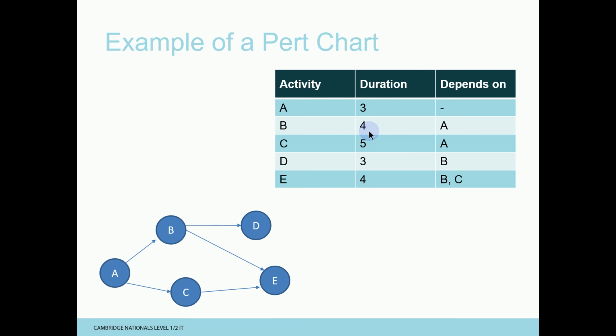So it takes into account any changes that occur in a project schedule that would affect the finish time. It uses the nodes shown as the circles. Now the nodes represent milestones to be achieved during the project, whereas the arrows themselves represent the tasks. So this is a little bit different again from the Gantt chart. These are milestones, but these are the tasks. So the arrows represent the tasks.